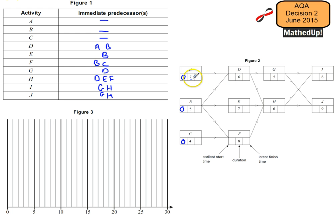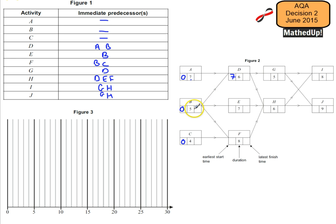D can start after 7 minutes or after 5 minutes, so it needs A and B to be completed first. So it needs to start after 7 minutes - both A and B would be completed after 7 minutes. For E to start, B needs to be completed, so that's after 5 minutes. For F to start, both B and C need to be completed, so it starts after 5 minutes.